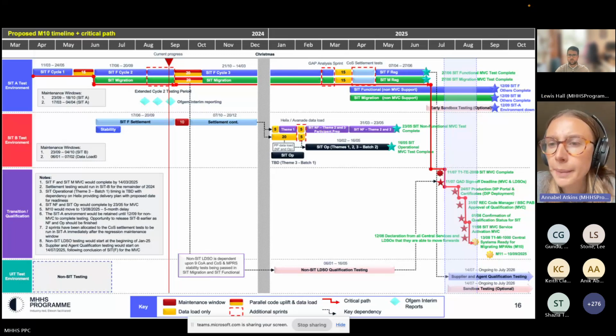So I think we've covered this off, but can we assume the pit exit and QT entry criteria dates move in line with the QT start date? Yeah, so we'll confirm all of those timelines in the programme plan. But yes, I think it's a safe assumption that those timelines will shift to the right as well, to enable more time for those pit activities to complete.